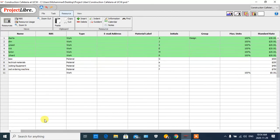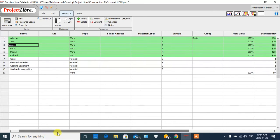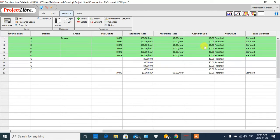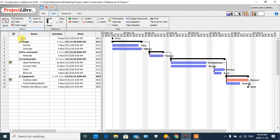We use 'Cost Per Use' for some personnel. For example, Sumit works in the department that purchases materials. He may be required to check the materials before ordering, in terms of quality and the workshop, etc. For this person, I should consider $200 for transportation costs during the project. I also want to explain two effective columns in our project view.